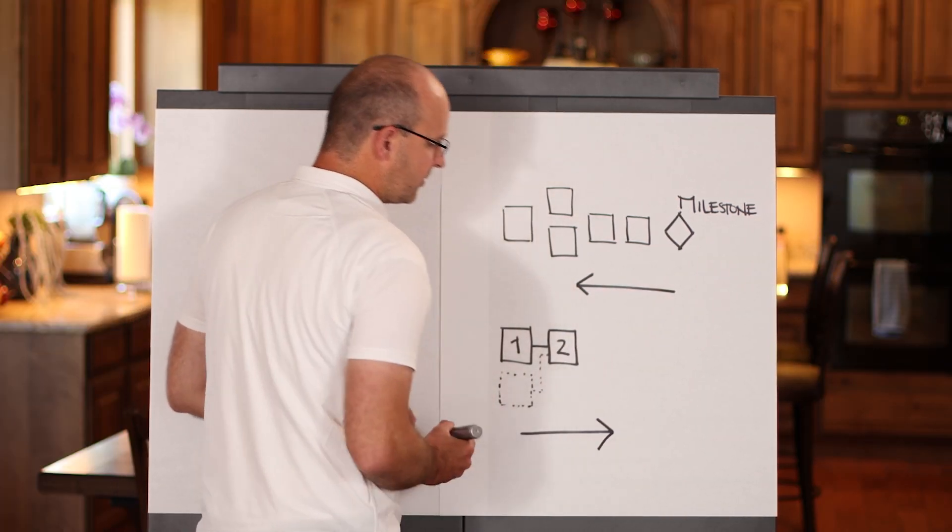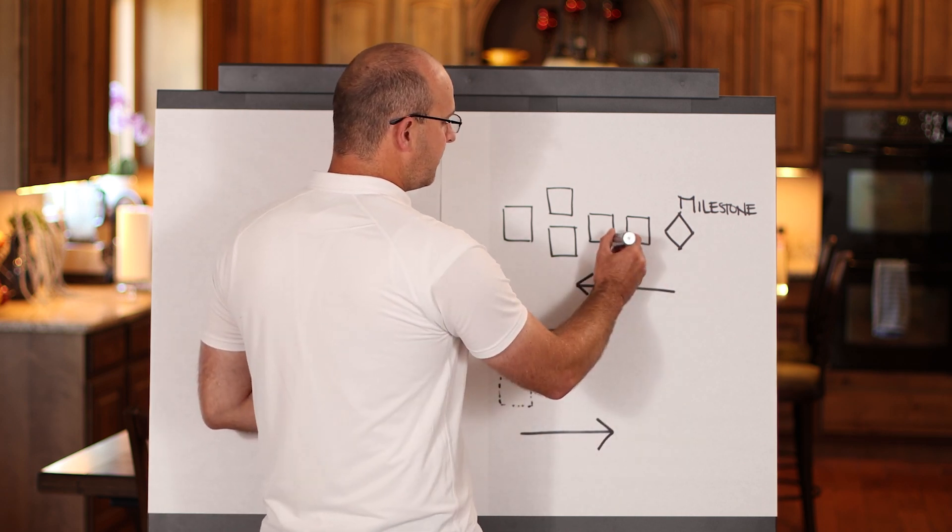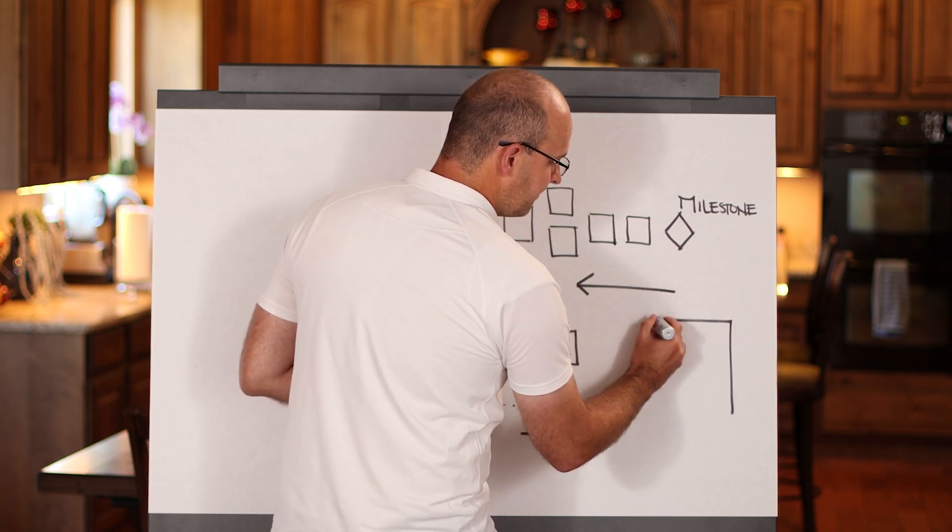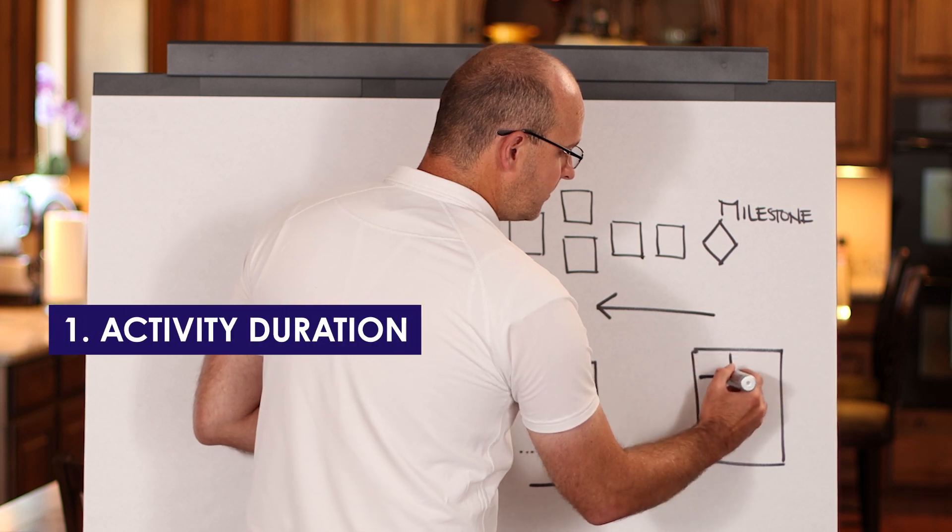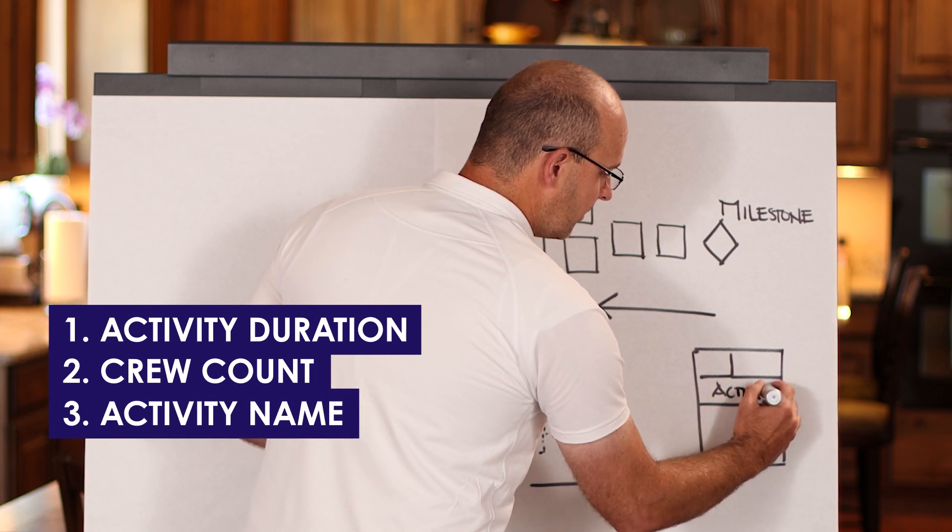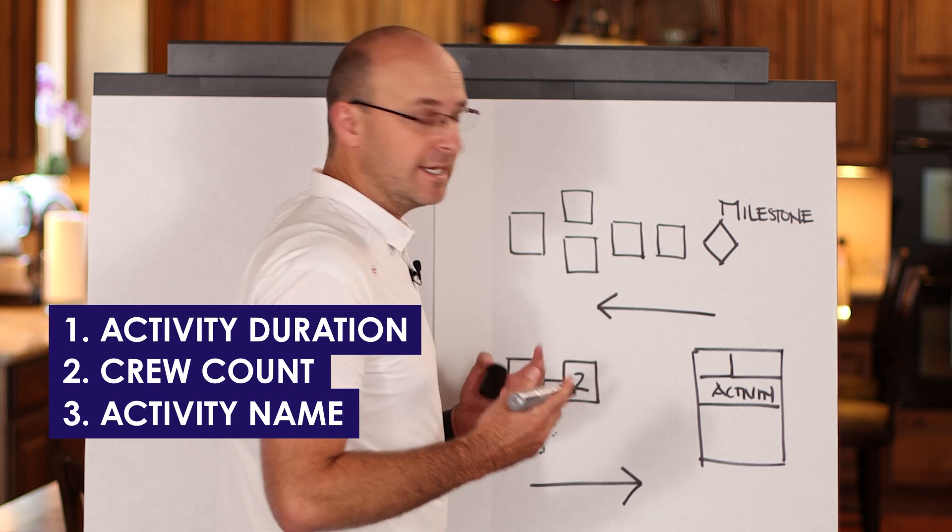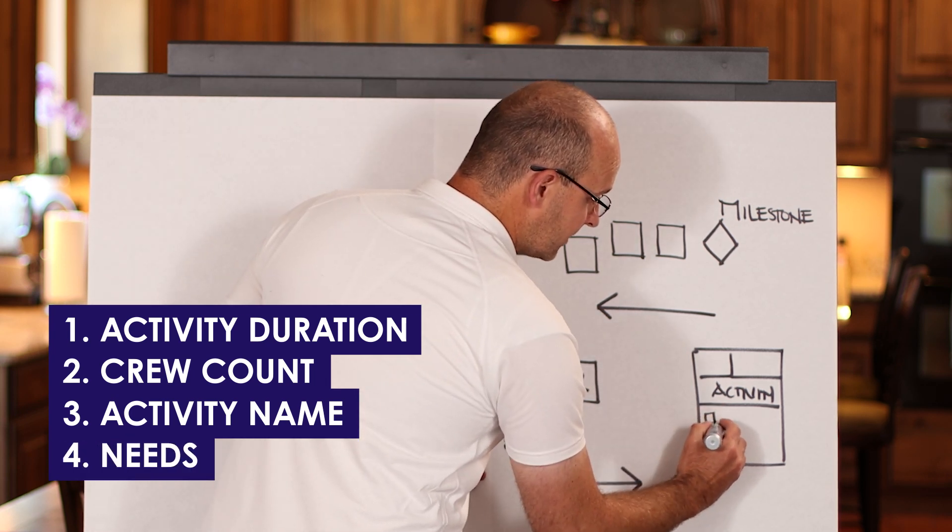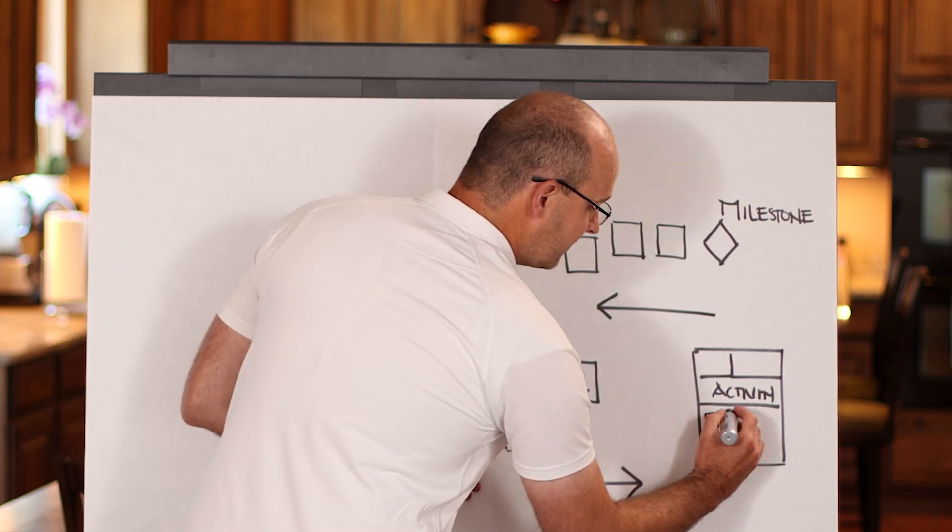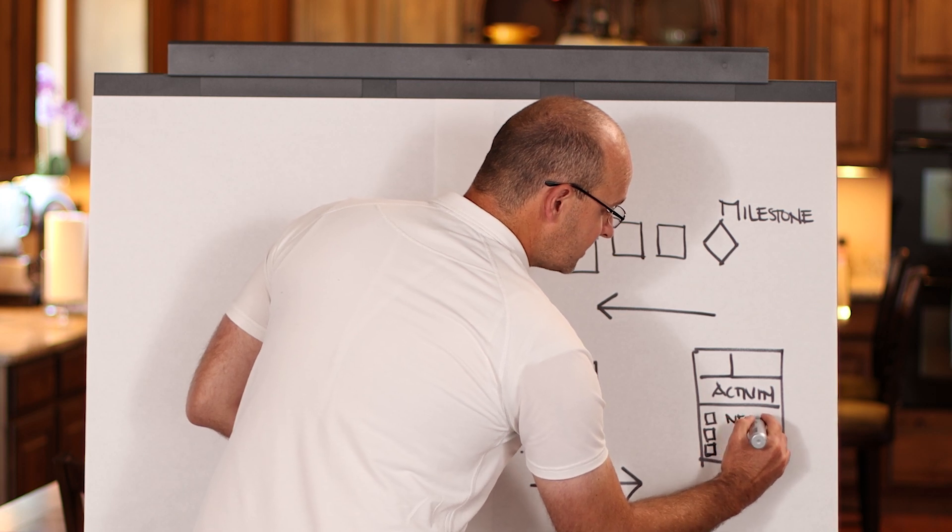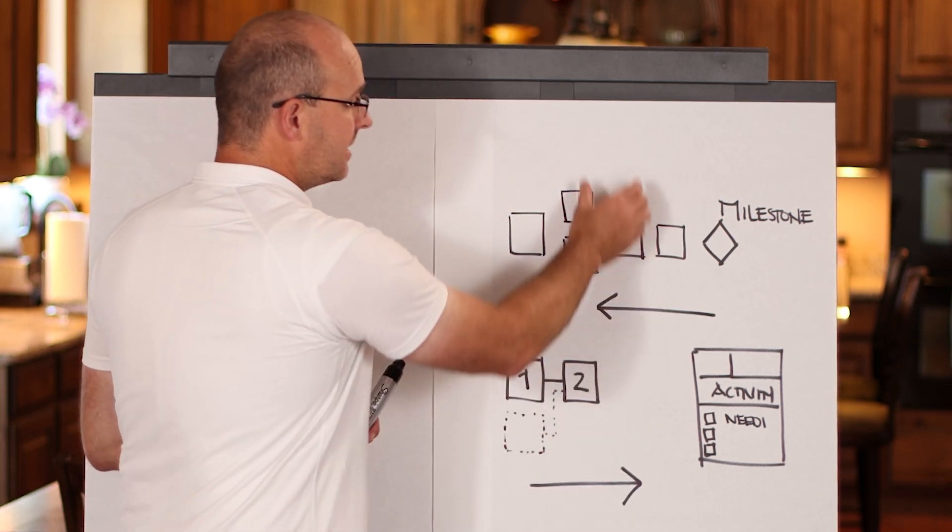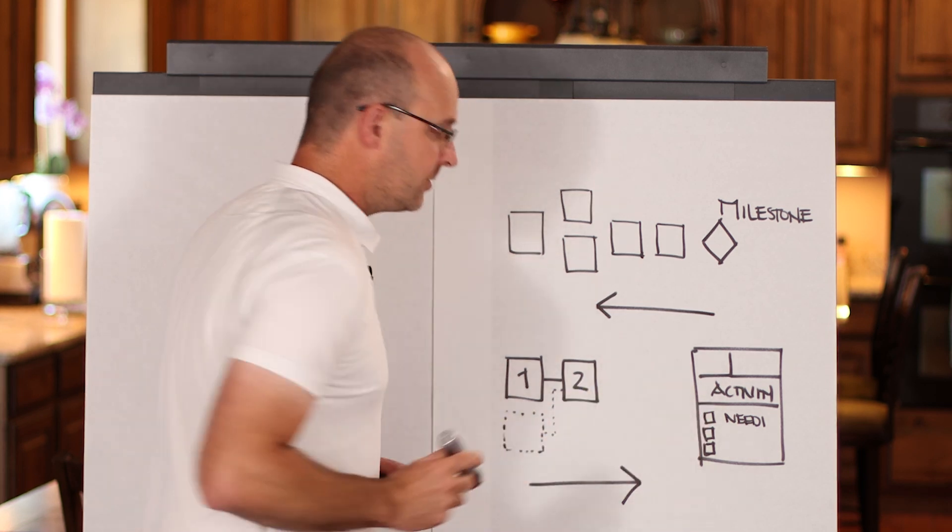Now when you do it backwards, when you're doing a pull plan, you're running it backwards and your sticky format will look like this. Typically you will have your activity duration, you will have your crew count, you will have the actual activity name, and then you'll have something really interesting. You'll have needs, or what some people call predecessors, or what some people call constraints.